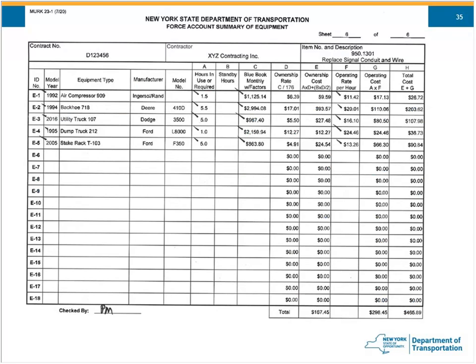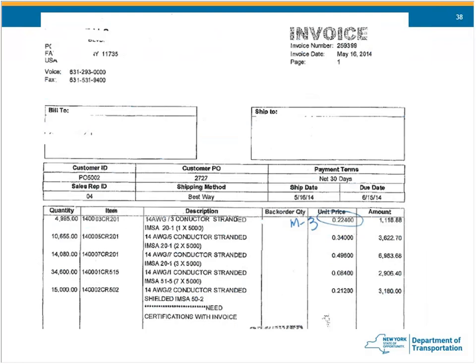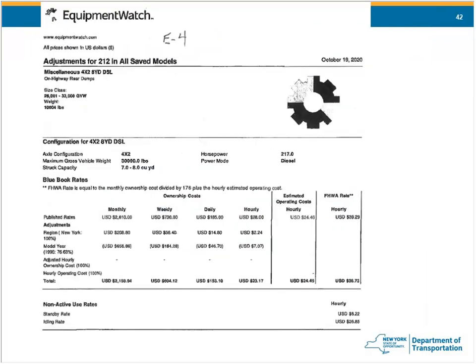I've had inspectors refuse to sign MERC 31s because they felt that it puts them at liability for the exactness of the info. How much liability responsibility are they subject to? The inspector signing the MERC 31 is only signing, and let me bring up a 31 again, they're only signing that that is what they witnessed.